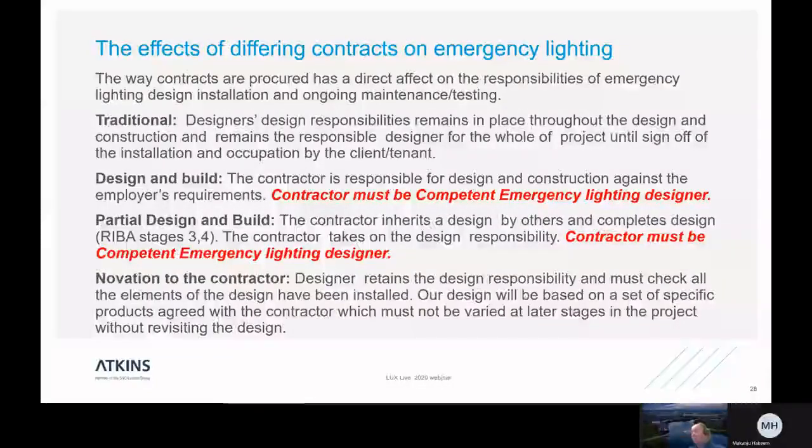So we've just had a project recently where we have been novated to the contractor, and the contractor has a company that they wish to use for the emergency lighting. It wasn't the one that we designed upon, and we had to tell the contractor, if you want us to design that, then we've got to redesign and check the design with the new things. Here's our fee for doing it. And that's really very, very important. You can't just change the luminaires immediately.